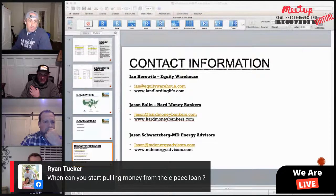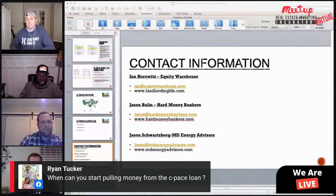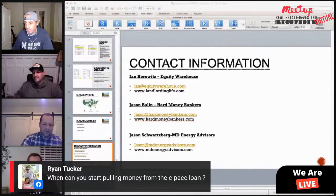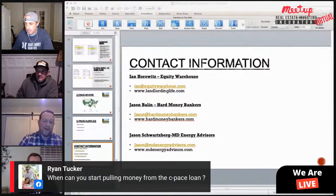So next question from Ryan: when can you start pulling money from the C-PACE loan? I'm guessing that's an existing C-PACE loan that's already in place. And I guess the question is, after, let's say you have a $500,000 C-PACE loan in place, how and when can you start pulling funds from it? Yeah, that's a good question. Probably the easier way to answer it is on a retrofit, a value add. If you're putting in roof, windows, lighting, HVAC, we'll put a disbursement schedule together, a draw schedule. And as soon as you incur the energy related costs, you have access to the funding.